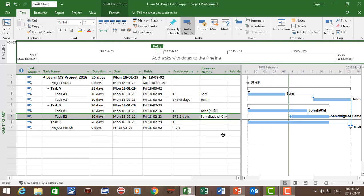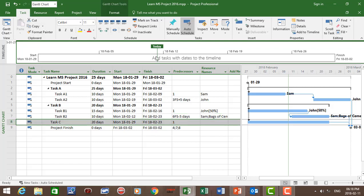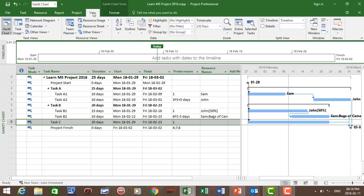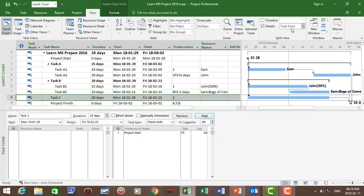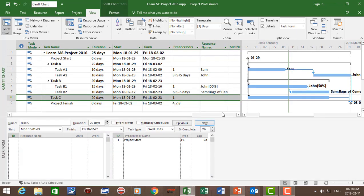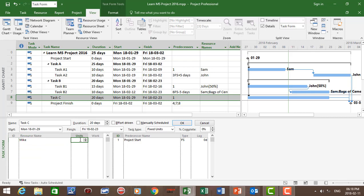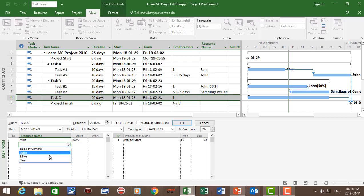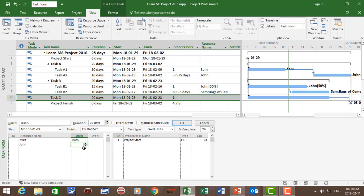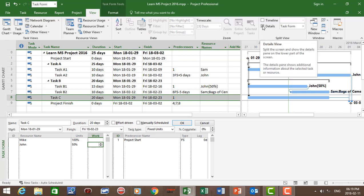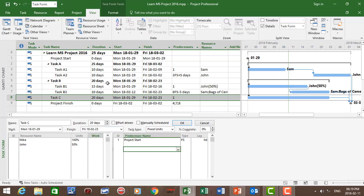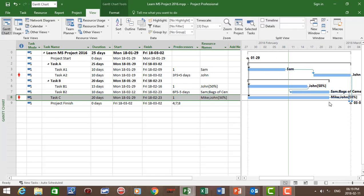The third way to assign tasks to resources: go to Task C, click on the View tab, then click on Details. The task form opens up as a split screen. Click on the resource name and assign Mike at 100%, and also assign John at 50% of his time. Then untick the split screen. You'll see Mike and John have been assigned — Mike at 100% and John at 50%.